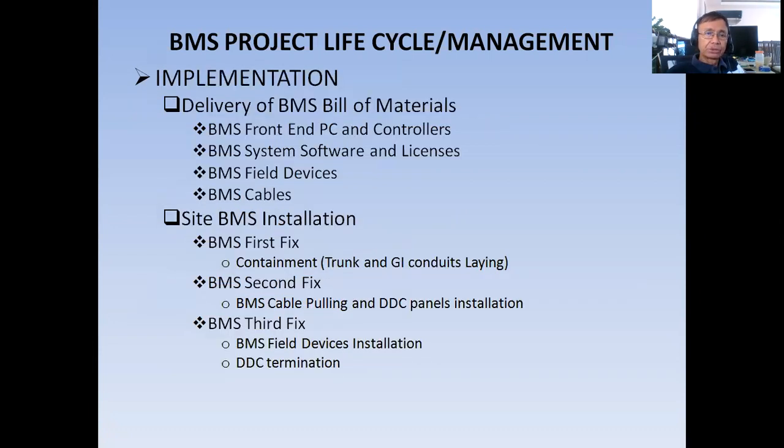Okay, so let's go to implementation. After initiation and planning, and once your material submittals are approved, then it's time to do the implementation. In implementation, I have two things. First, delivery of the BMS bill of materials, the one approved by the consultants. You need to deliver it, but first, of course, you have to order it from your principals. Then you have to give the ETA, the estimated time of arrival of these materials to the site.